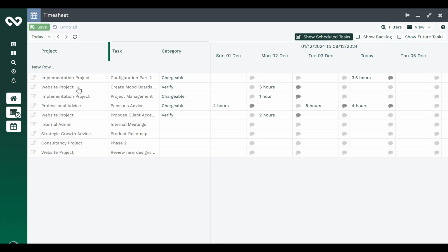And if I come into our resource scheduler, another cool area of projects, here on my left-hand side, I've got all of my team members that are working on projects. Across the top, I've got the dates. It's green if they're under allocated and it's red if they're over allocated. So if we drill into Debbie, we can see what that means.